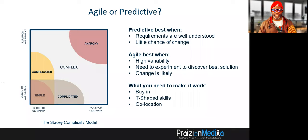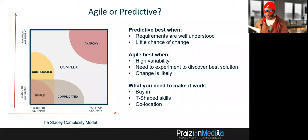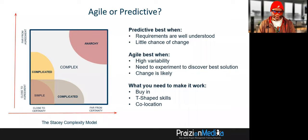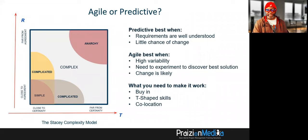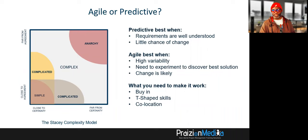On page 14, we have requirements uncertainty on one axis and technical degree of uncertainty on the other — the Stacey complexity model. When you are far from certainty, you find yourself in the zone of anarchy, moving from complexity into anarchy — that's a perfect place to use Agile. Agile works best when there's high variability, a need to experiment to discover, and change is likely. Predictive in the simple zone works best when requirements are well understood. Another key part of PMI's Agile Practice Guide is the continuum of life cycles, showing when to use predictive (low degree of change, low frequency of delivery) and when to use Agile (high degree of change, high frequency of delivery).